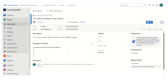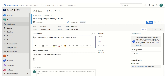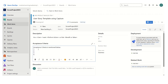This particular feature could be very beneficial if there are team members who are new and not very familiar with user story writing. They can use any of the existing templates defined. This will give them a hint that in the description, they have to utilize the user story format — as a developer, as a customer, whatever action they want to perform, what value we are getting out of this user story. Similarly, this denotes that acceptance criteria goes here. We have already pre-populated the area and iteration path, so this is very handy.